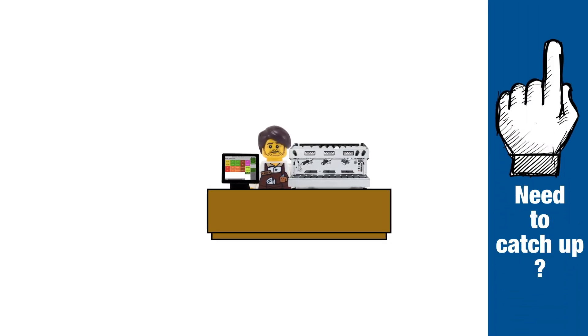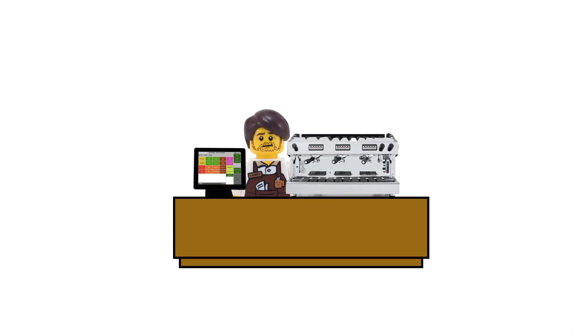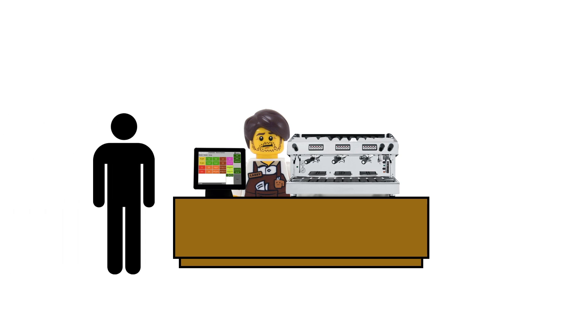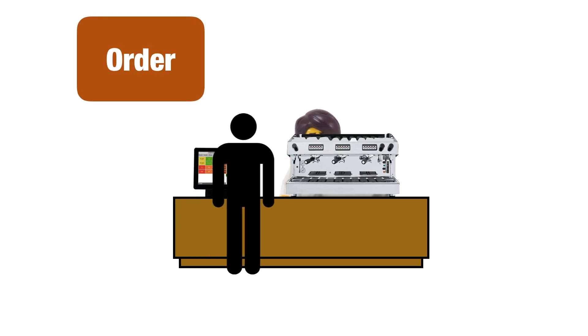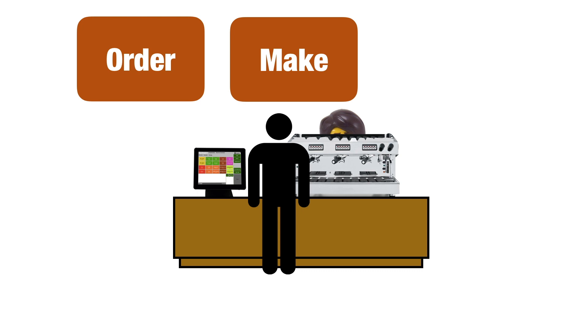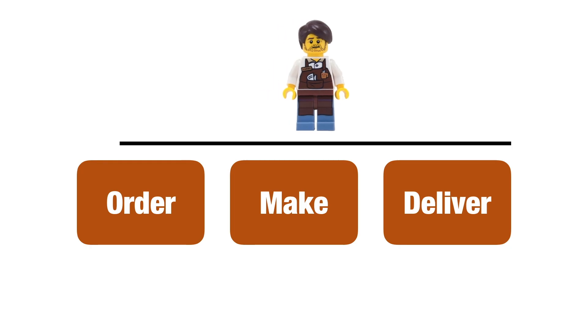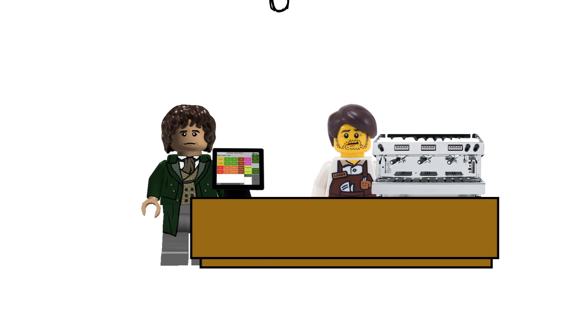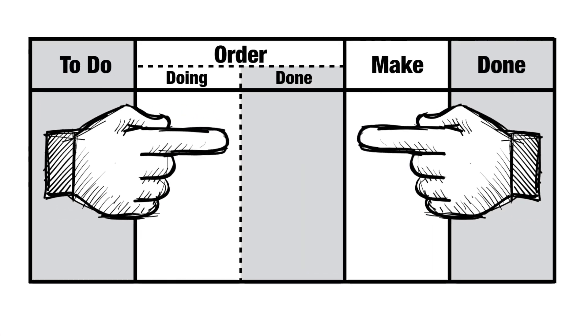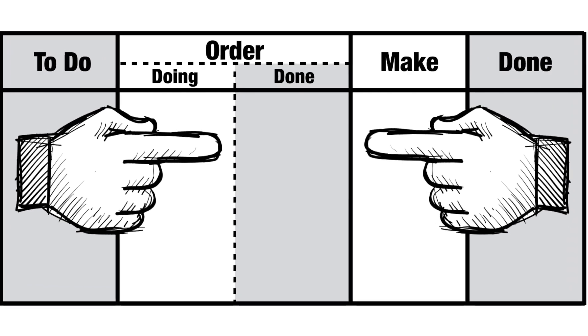Things started so well, so simply — a lone barista bestriding his humble coffee shop like a colossus, doing everything in his defined process: taking the order, making the coffee, and delivering it back to the customer. Adding a dedicated order-taker into the brew didn't seem like such a big deal, but with specialization came the need for orchestration. Key to that was the buffer — in the coffee shop, this area of counter; on the board, this column. The gray color is a reminder that no value is added here. Waiting is one of several forms of waste, but it is a price we pay willingly for switching the system from push to pull.